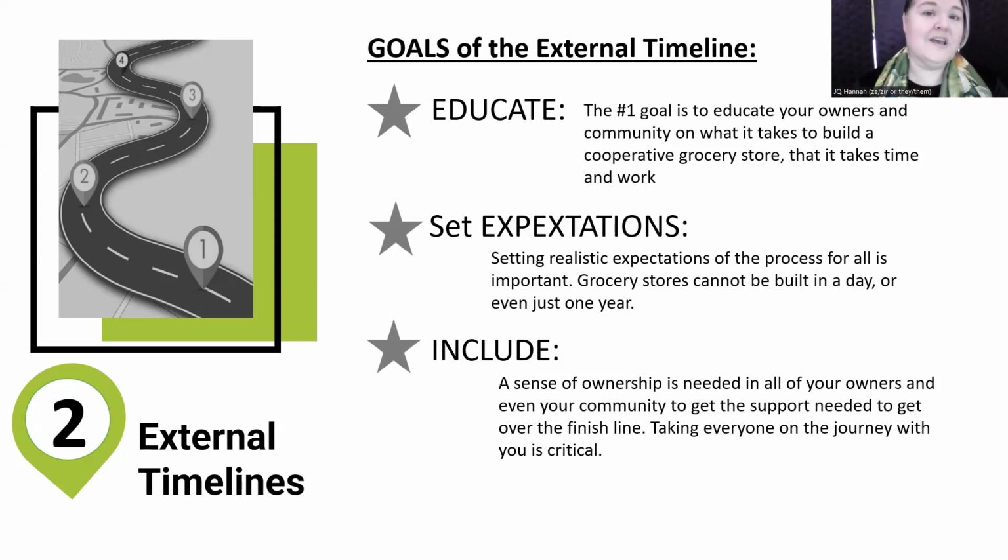There are some decisions the board is going to have to take on their own, without owner input, to protect the business you're all hoping to develop together, like site. Usually the final site selection, and we highly recommend the final site selection is not a community vote, because that exposes you. It's a whole other session, but for real, we have seen developers and other grocery chains snap up a site that a co-op was voting on. It's only happened a few times, but that's all it's got to happen. They snap up that site and say, oh, we'll just rent it for the next 20 years so you can't have it.